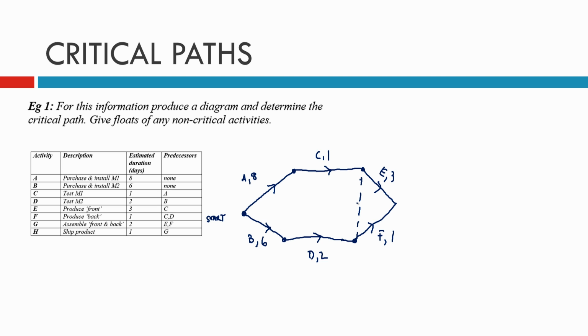So now we're saying they're both at the same thing, and we put a capital D for dummy, and a 1, because it's our first dummy, with a 0 on there. Big 0, little 1. So it means it's the first dummy, and it has no activity, no days on there.